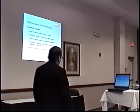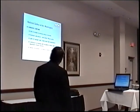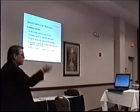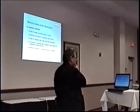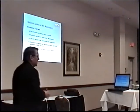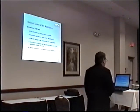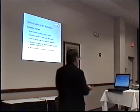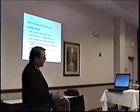So, lessons learned. I guess one thing I learned is that for the installing and doing the tubing bending and doing neat work and beautiful bends and aligned pipe and whatnot, get a good sprinkler guy who's willing and wants to make an issue of that, and you can get some really, really nice work. I think the sprinkler contractors, the right foreman, and the right guys can do nice work. Hydraulic calculations, you had 2 contractors in this. The first phase was done with the contractor who spent all the money learning about this stuff and trained the fitter.